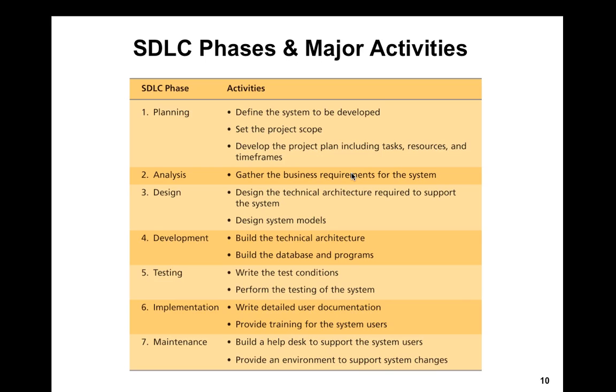And at each one of these discrete phases, we have accomplished something. So at the end of stage number 1, as an example, we hopefully have our plan. And we work with a project manager sometimes to get the plan organized. To say, okay, the next stage we're going to do analysis, and then we're going to go into design. And then the project manager can outline all of this and make it manageable, allocate resources and staff, saying, you guys are going to be working on the analysis, you're going to be working on this, and they're assembling the project team, and they're creating essentially the plan.